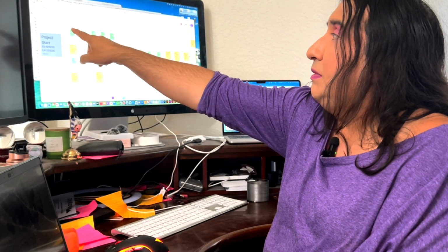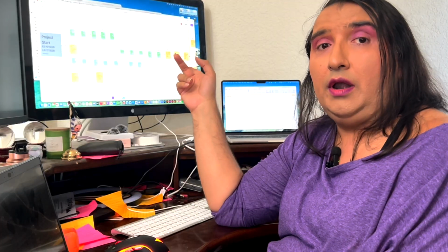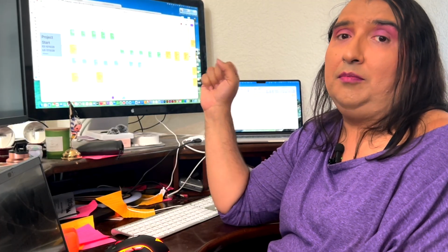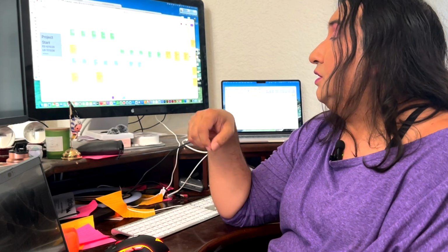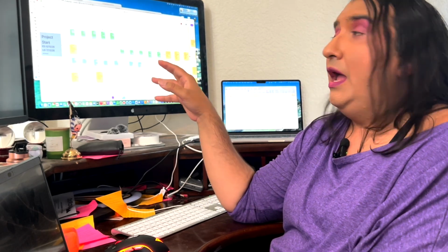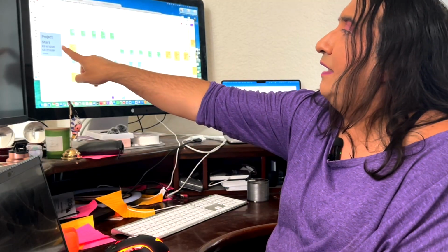So you see these numbers up here? That is our slack. That is how many days we can move that task forward without impacting our timeline, without having to shift our published date. So what I want to do now is go over what I did here, and then also talk about this little highlighted portion here, which is called our critical path.